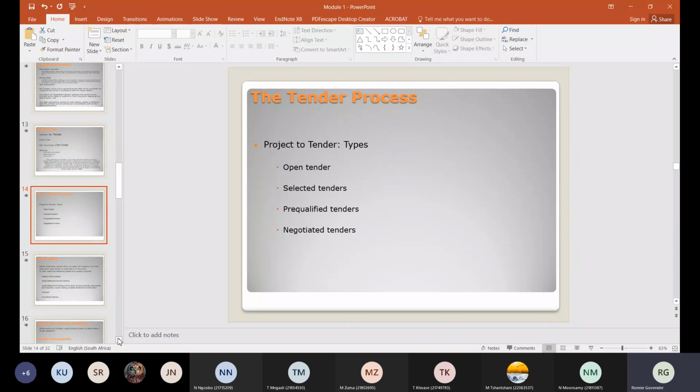That's how it works. But if the guy at 200,000 says, hey, no, listen, I made a mistake, it's 300,000, you don't want to give him the job now. You can't. You have to give it to somebody that was more than the price. But you just want to know, hey, are you right? Or do you still insist you want to do it at 200,000? If you still insist, we'll give him the work, if he's a legitimate and experienced tenderer as well.